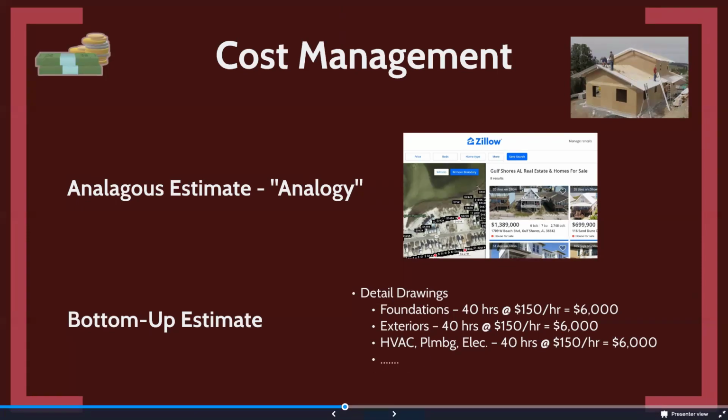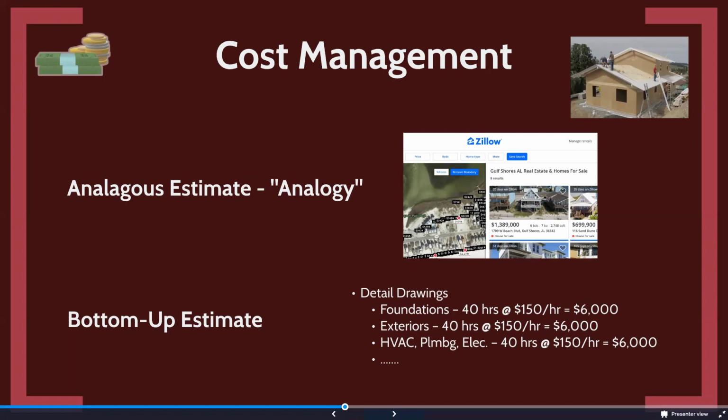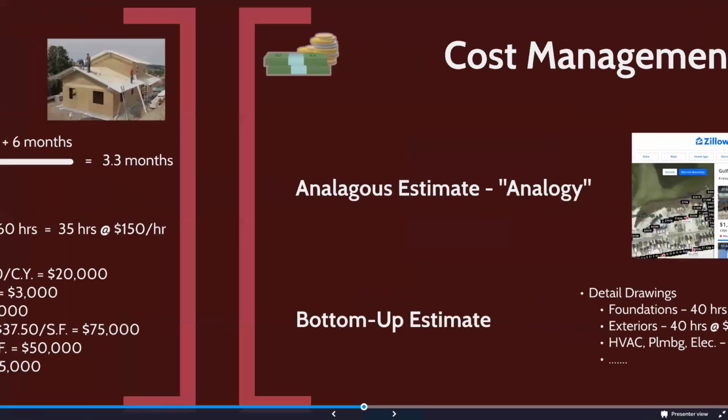Then, of course, you have the bottom up estimate. Now, this would be more like what your architectural or design services engineers might do. It's where you're breaking down. So imagine if you were doing detailed drawings for something, you would figure out that, well, we have foundation drawings that need to be developed, exterior drawings that need to be developed. And so you would associate hours and costs with those, but you're building all the components.